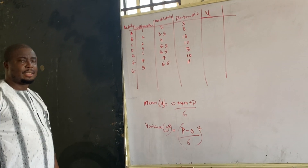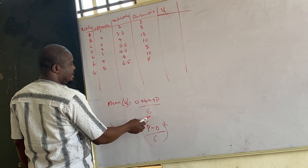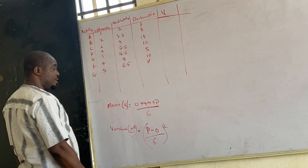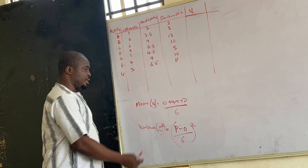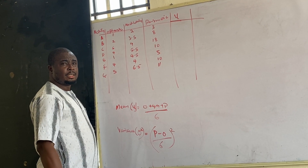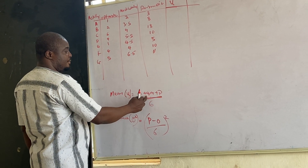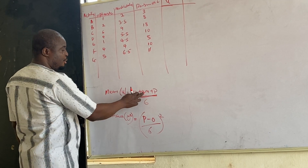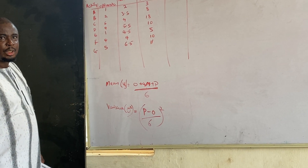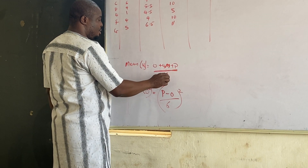In determining the mean, the formula is: optimistic plus four times most likely plus pessimistic, all divided by 6. The key thing to remember is that you multiply the most likely value by 4. The weights are 1, 4, and 1, which sum to 6 — that is why you divide by 6 to get the mean.